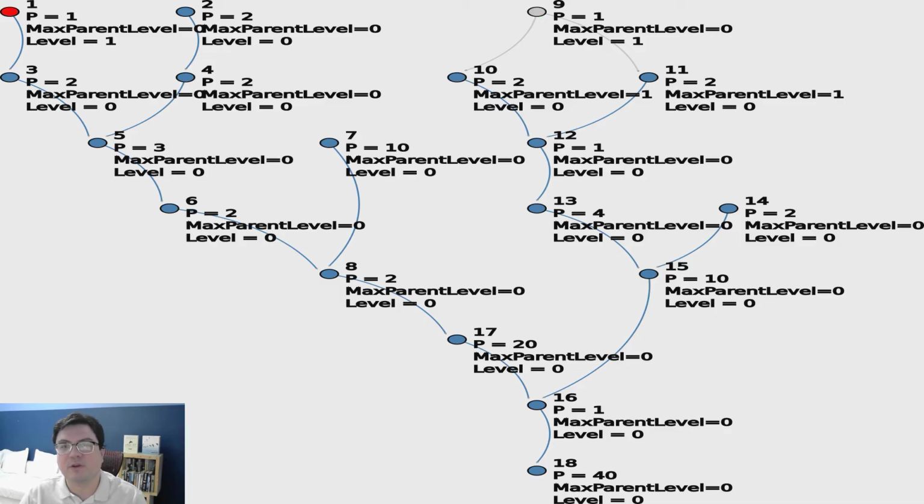The process continues by picking another vertex. Here, the algorithm picks 1 next. The algorithm unfolds by considering the vertices one at a time. There is no particular order in which this process has to unfold, as long as a vertex is considered after its predecessors. Eventually, the entire DAG has been considered, and the vertex with the highest level will be the vertex that ends the critical path. One can then reconstruct the chain of tasks that form the critical path by tracing back the predecessor with highest level until a vertex without predecessor has been reached.